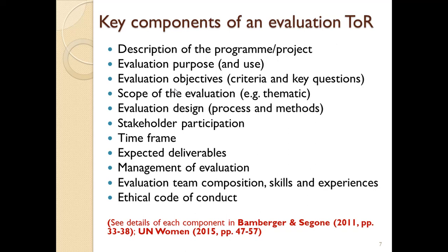The terms of reference also talk about the time frame in terms of how long and when the evaluation should be done, and when the deliverables of the evaluation should be delivered, in terms of maybe comprehensive reports about the entire process of evaluation, when they should be delivered to management for further action. Could be annual, could be biannual, could be quarterly, could be monthly, so that the evaluation team knows when to report concerning different aspects of evaluation.